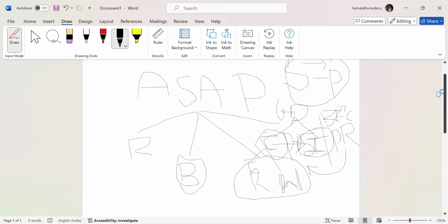Normally people do the unit test in the integration system also, but as per the standard we do the unit test in the quality system. The unit test will be very precise. This is quality; they'll expect more master data, more transactional data, and more analytical data, and you have to test each and every transaction and the reports also.